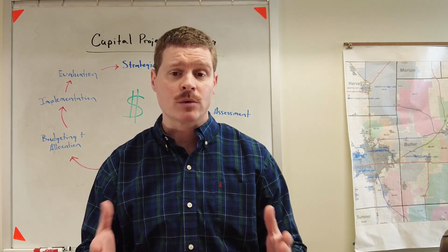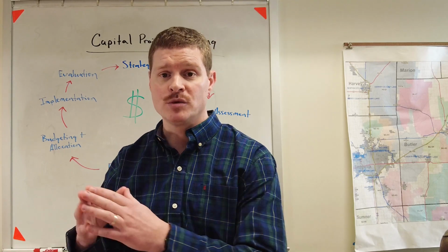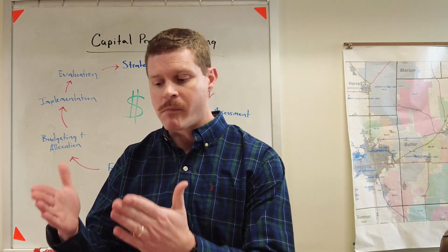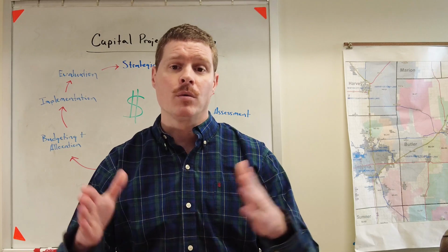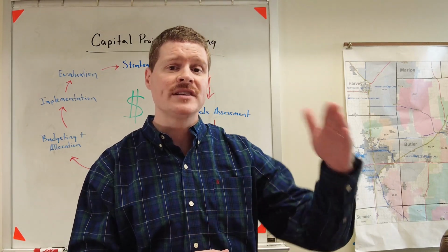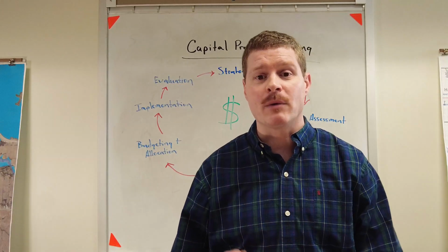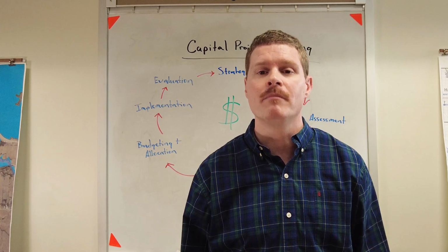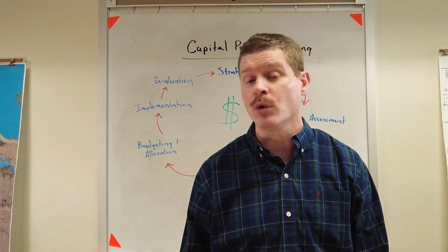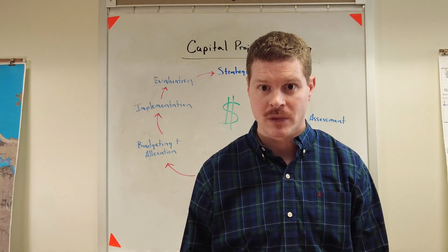In the case of a project where we're going to be issuing bonds, what we'll often do is we will issue temporary notes that will give us short-term financing. We will then do the project, and then once it's completed, we will roll the temporary notes into the long-term bonds. The important thing is that we budget those dollars so that we have the budgetary capacity and authority to spend those dollars so that we don't violate state budget laws.